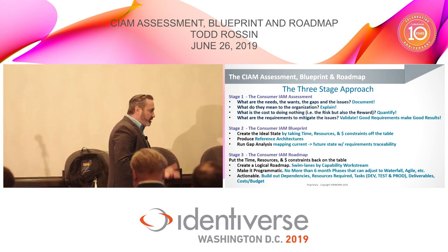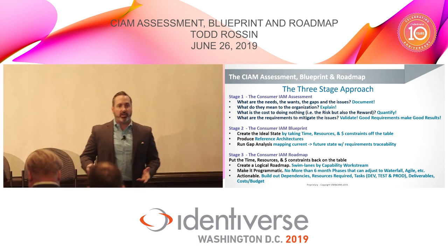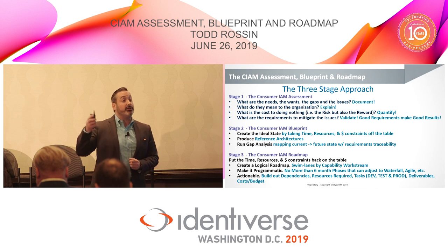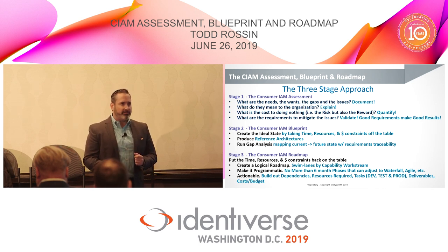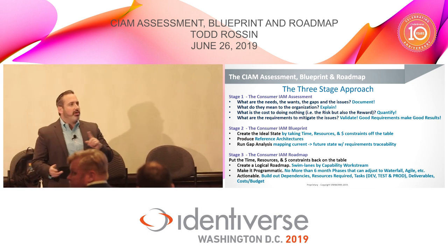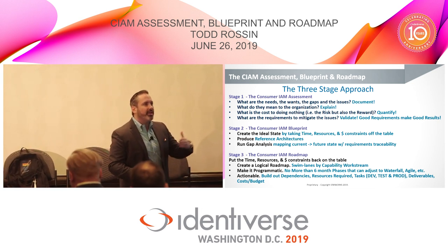This is very different from the enterprise side because the enterprise side is typically a 3+ year endeavor. A lot of times with consumer, it could be 12 months, it could be 6 months, it could be 2 years. I have yet to go to one that's been more than 2 years by default because although there's a lot to it and a lot of user base, the number of systems and methodologies behind it are much simpler. However, never go more than 6 months for a phase so that you can show in production things.